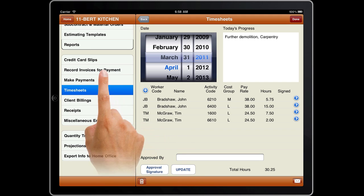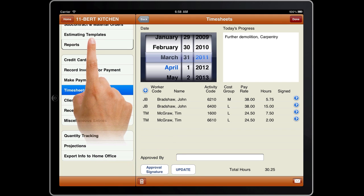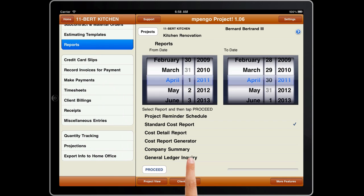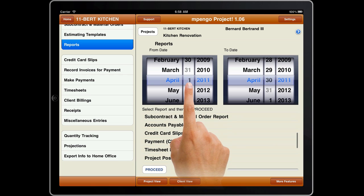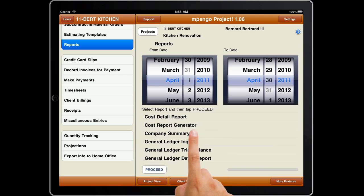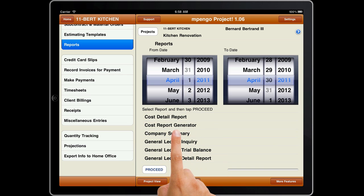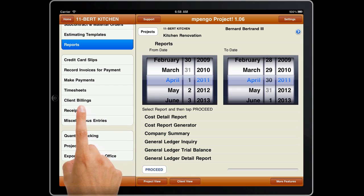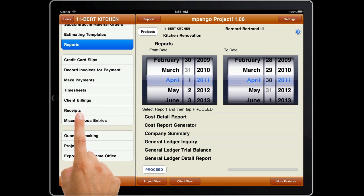There are many reports available to handle all phases of project reporting and general bookkeeping. There's even a report generator that lets you design your own cost report. An integrated accounts receivable, complete with client billing and receipt functions, is structured to handle the issues of retainage or holdback.